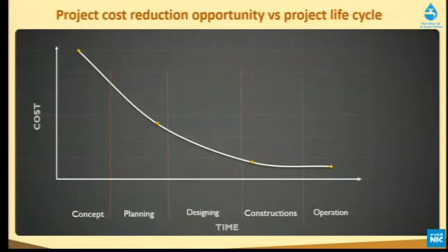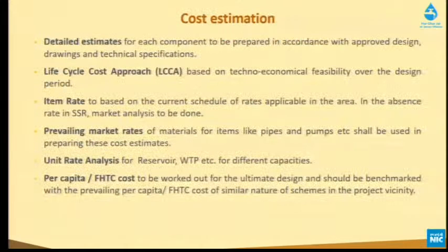Next, please. This slide I would like to focus on. So far we have discussed planning and design. What I would like to emphasize here is the project life cycle: concept, planning, design, construction. We can see that the opportunity to reduce cost is maximum in the concept and planning stages, and as we move forward, it's very difficult to reduce the cost. That's the reason I was emphasizing we should focus on concept and planning so that we can reduce the cost.